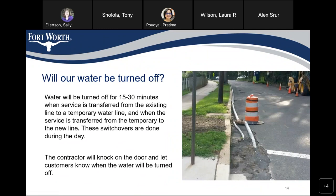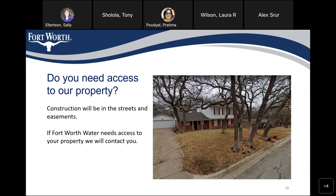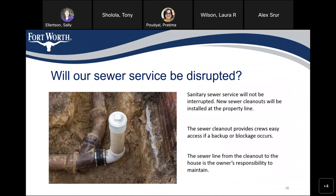Now we'll discuss some frequently asked questions. Will your water be turned off? Water will be turned off for 15 to 30 minutes when service is transferred from the existing water line to a temporary water line, and again when transferred to the newly installed line. These switchovers are done during the daytime, and the contractor will knock on the door to let customers know. Construction will be in the streets and easements — if the City of Fort Worth Water needs access to your property, we'll contact you beforehand. Sewer service will not be disrupted. New sewer cleanouts will be installed at the property line, providing crews easy access for backups or blockages. The sewer line from the cleanout to the house is the owner's responsibility to maintain.